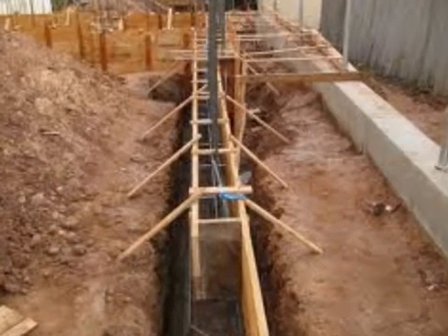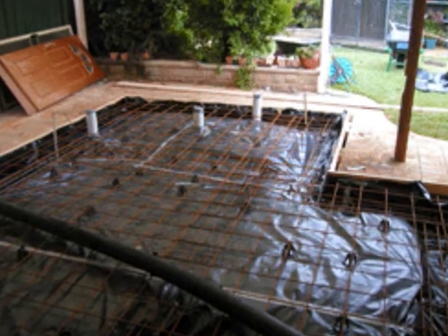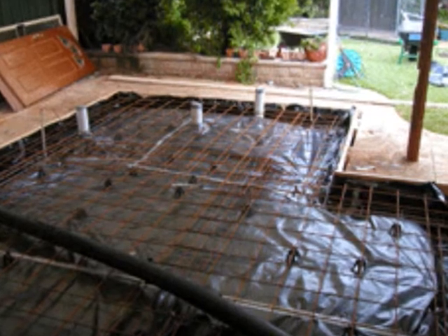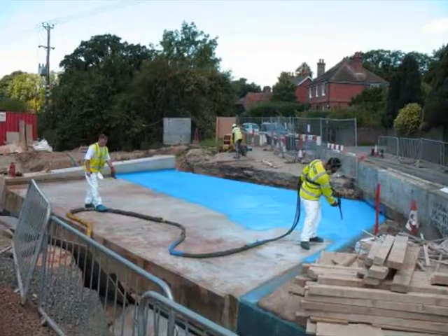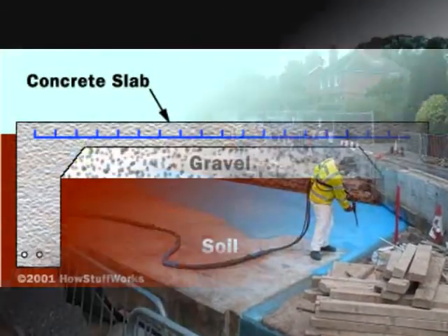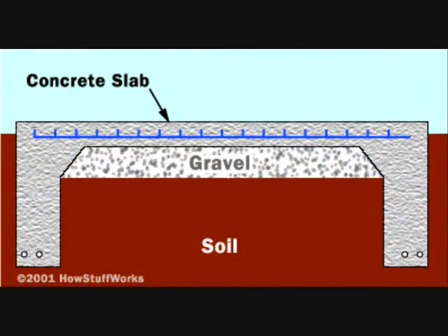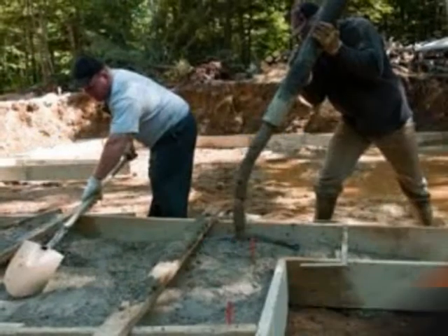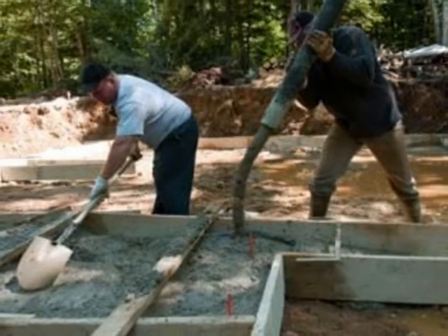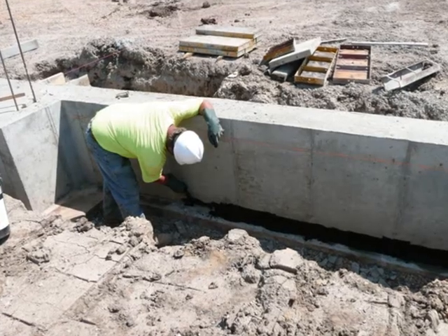Stage 2. Footings. Construct brick and block footings of prepared foundations. Oversite and slabbing. Construct a beam and block floor. Insulation is laid on top of the beam and block floor with a concrete screed on top of the insulation to finish. Drain. Excavation for all drains and one manhole.